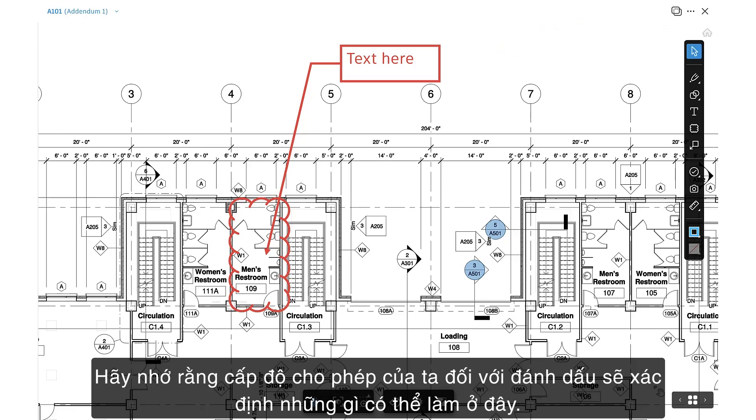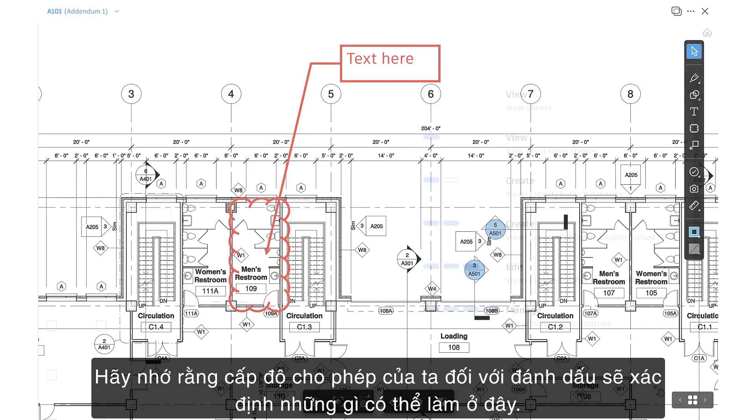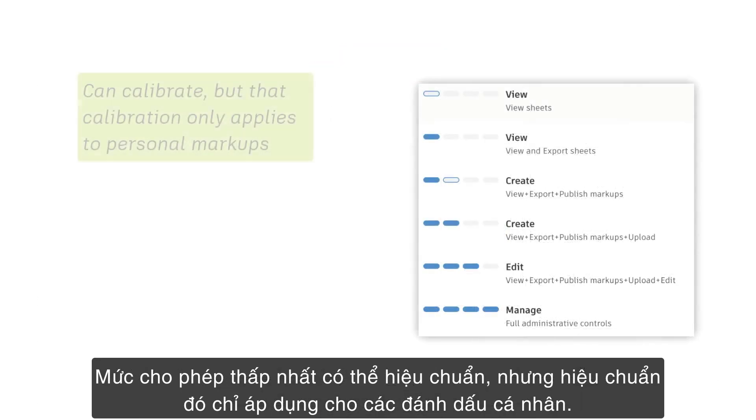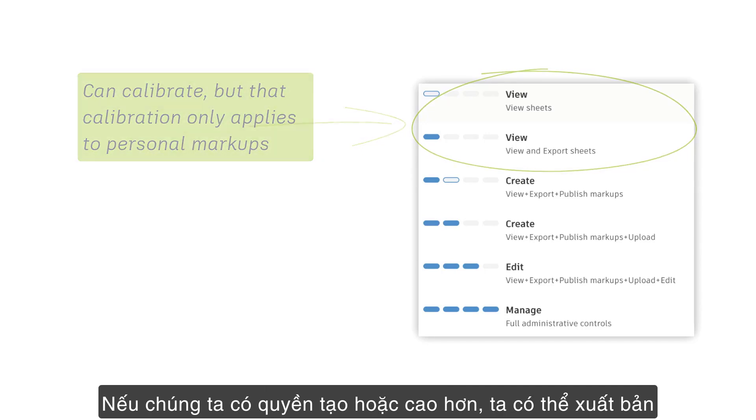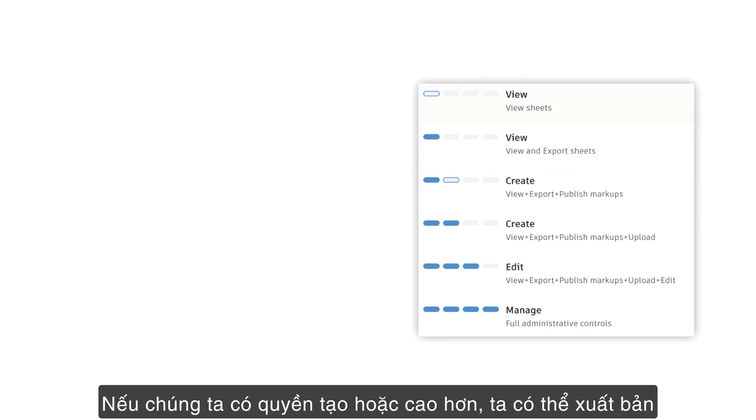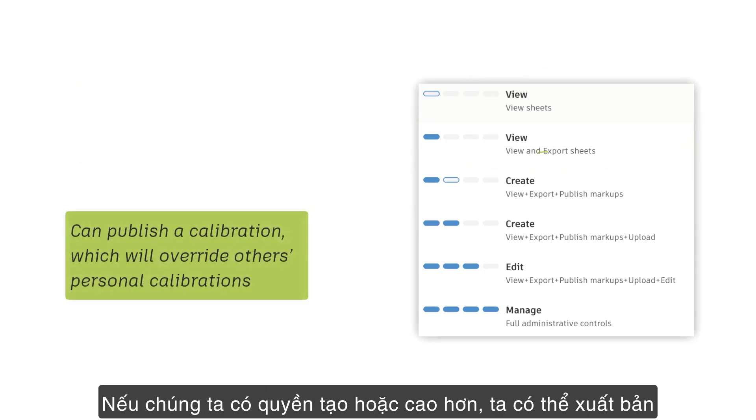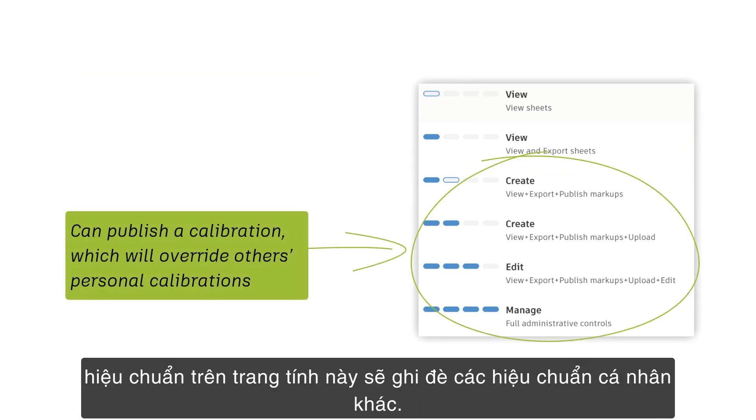Remember that our permission level for markups will determine what we can do here. The lowest permission tier can calibrate, but that calibration only applies to personal markups. If we have create permission or above, we can publish a calibration on the sheet, which will override others' personal calibrations.